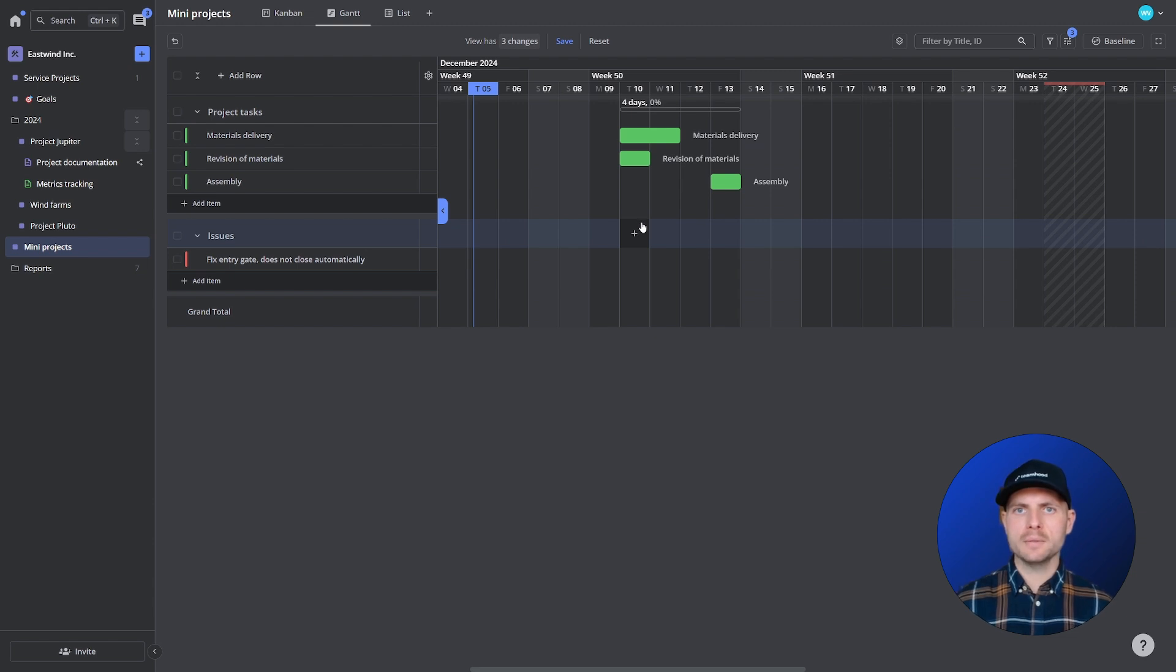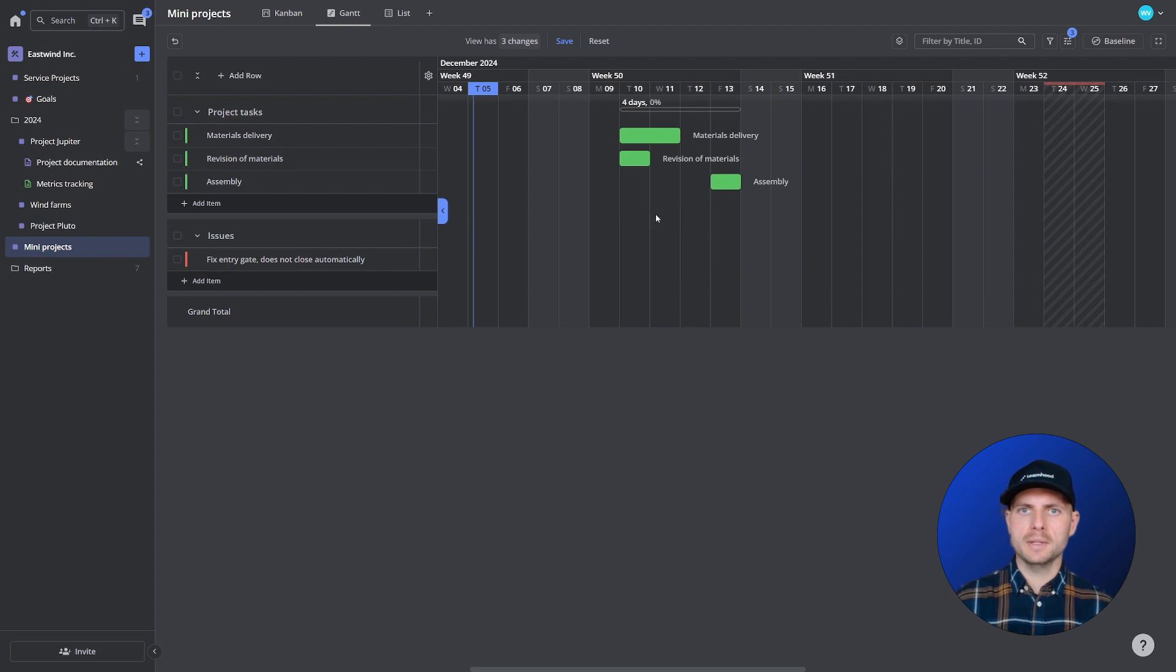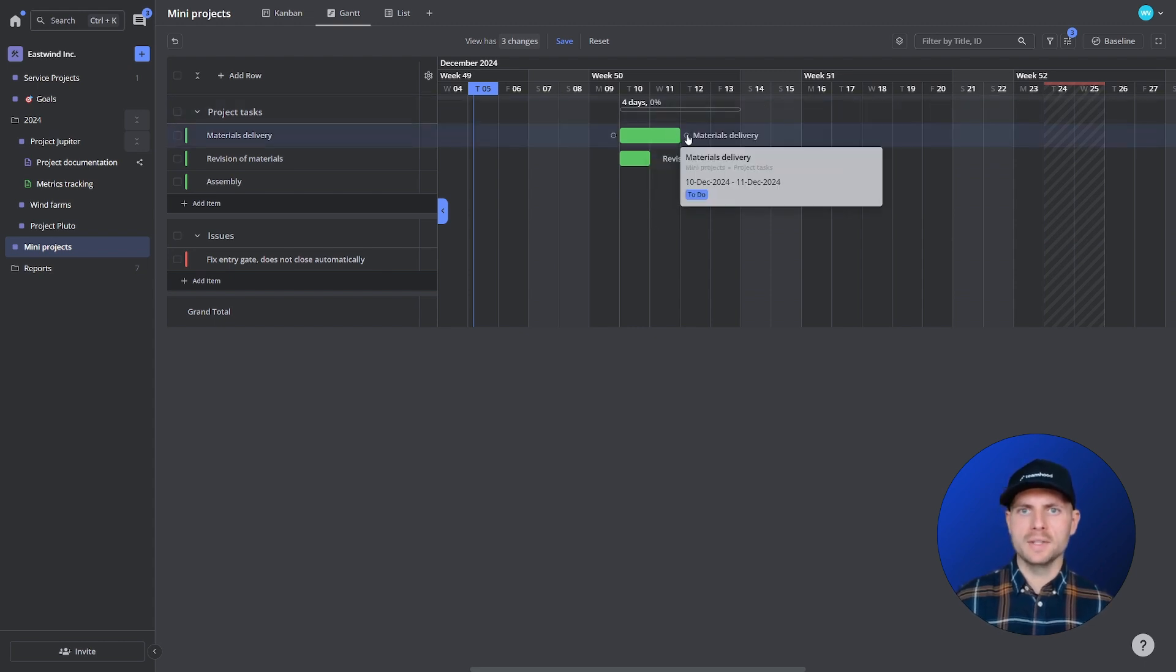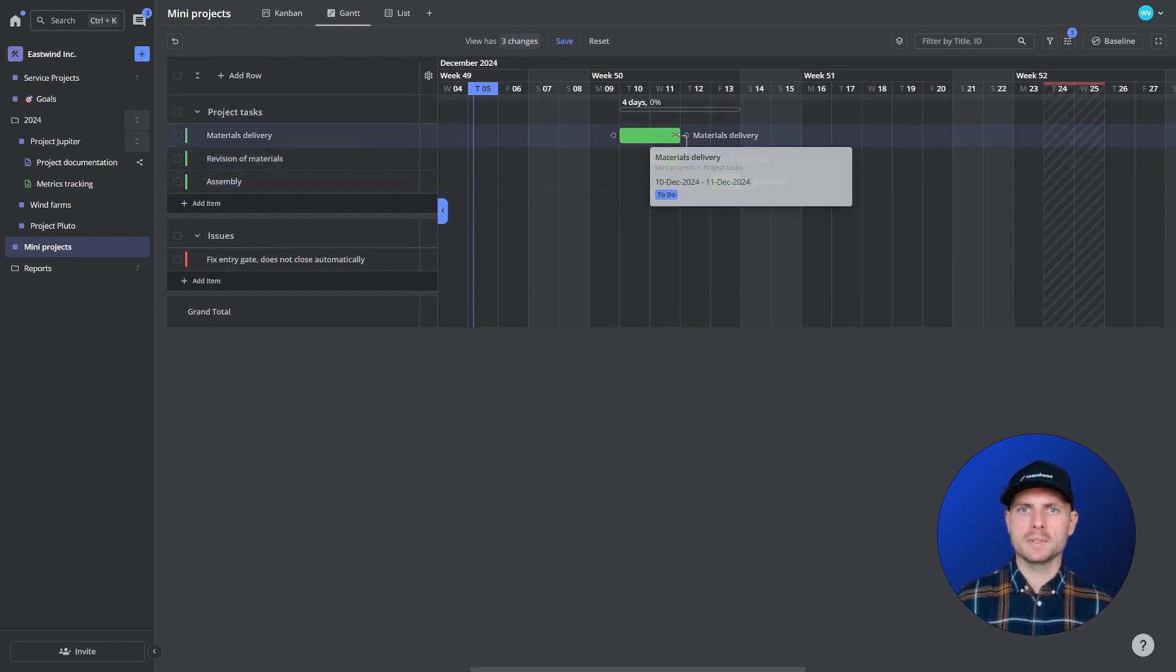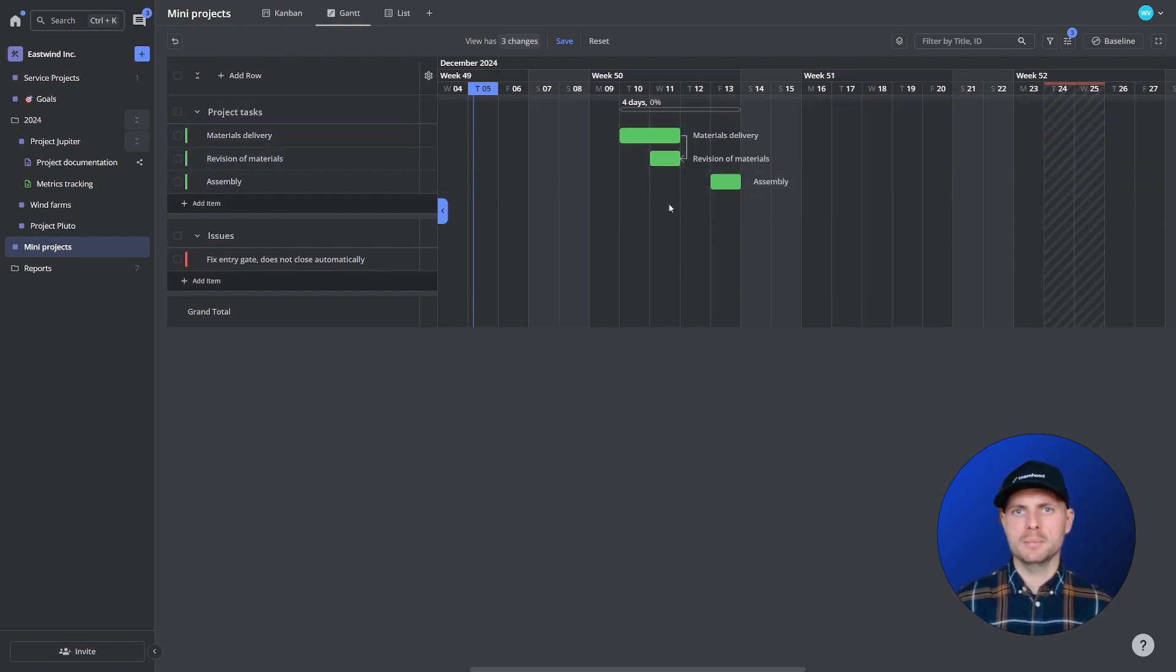Now the first question is can I start revisioning materials on the same day when they arrive? Well if the answer is yes I will use finish to finish dependency type. So both items get finished on the same day.